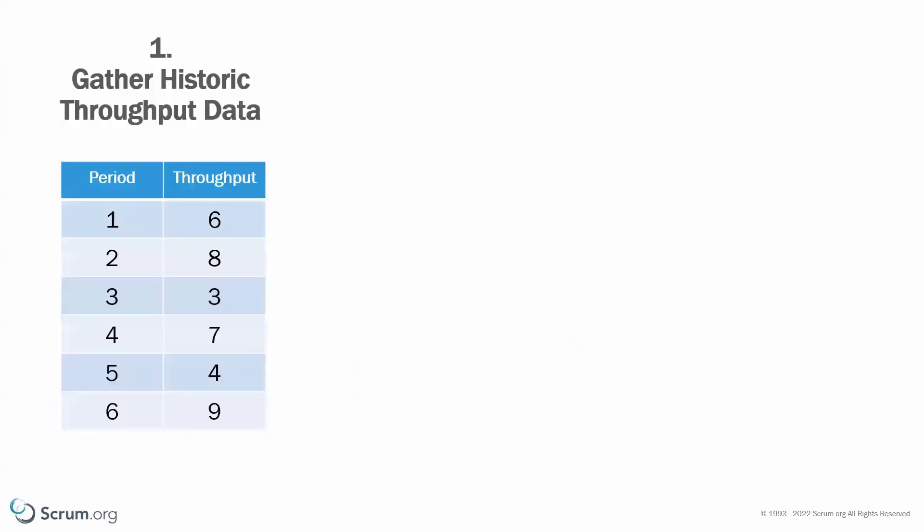The first step when we do a Monte Carlo simulation is that we gather throughput data — historic throughput data. Throughput is the number of items that we have delivered in a specific unit of time, which we refer to as a period. That could be weeks, days, sprints, whatever works best for you, but it has to be consistent within the whole simulation.